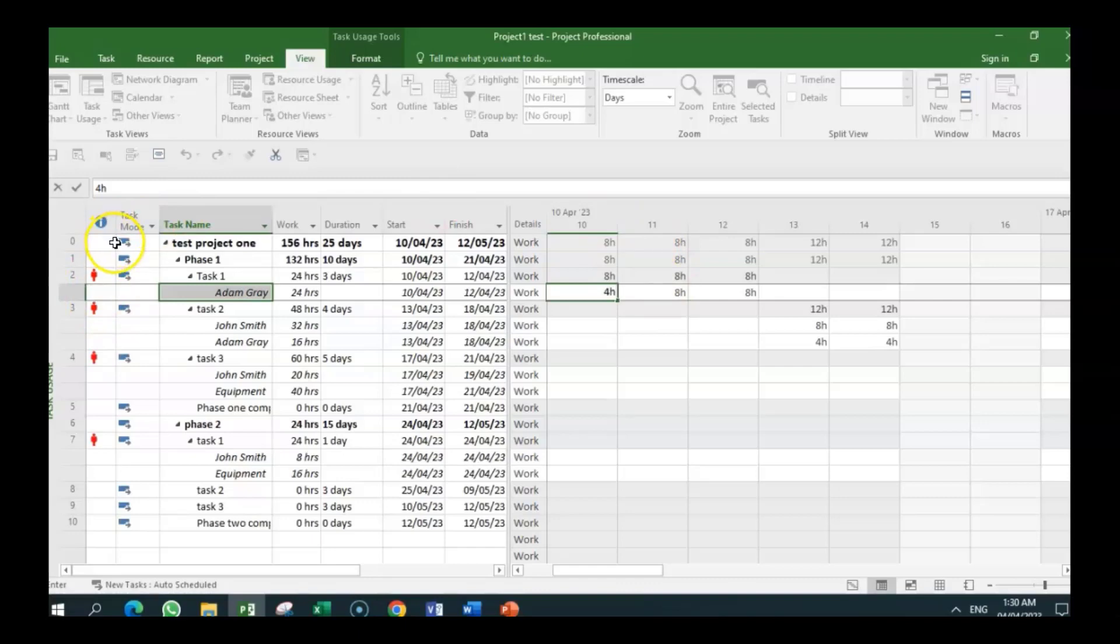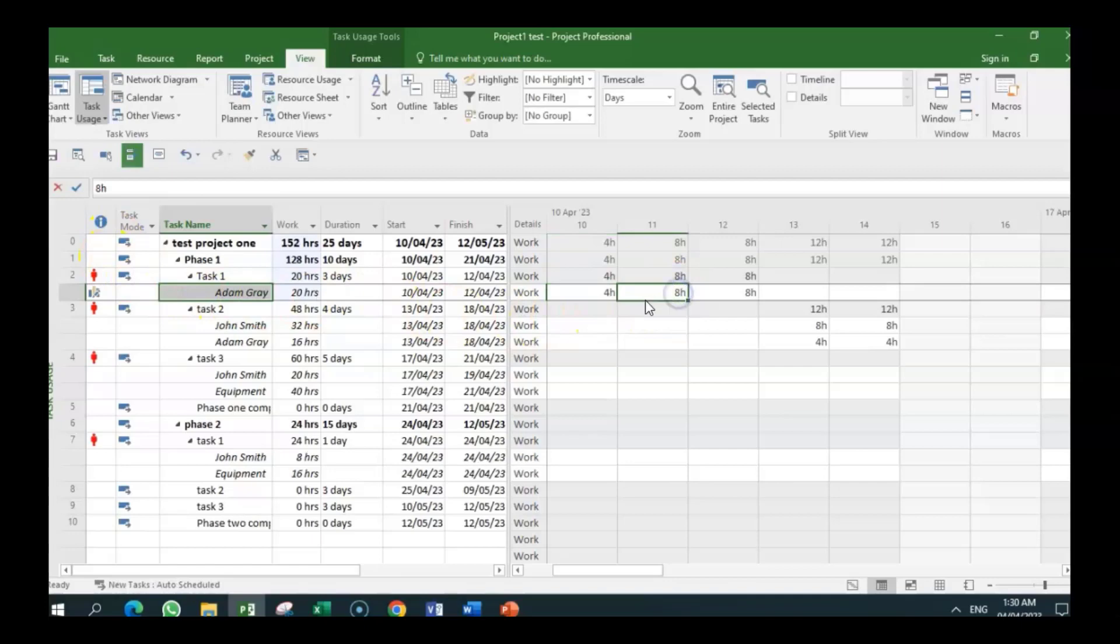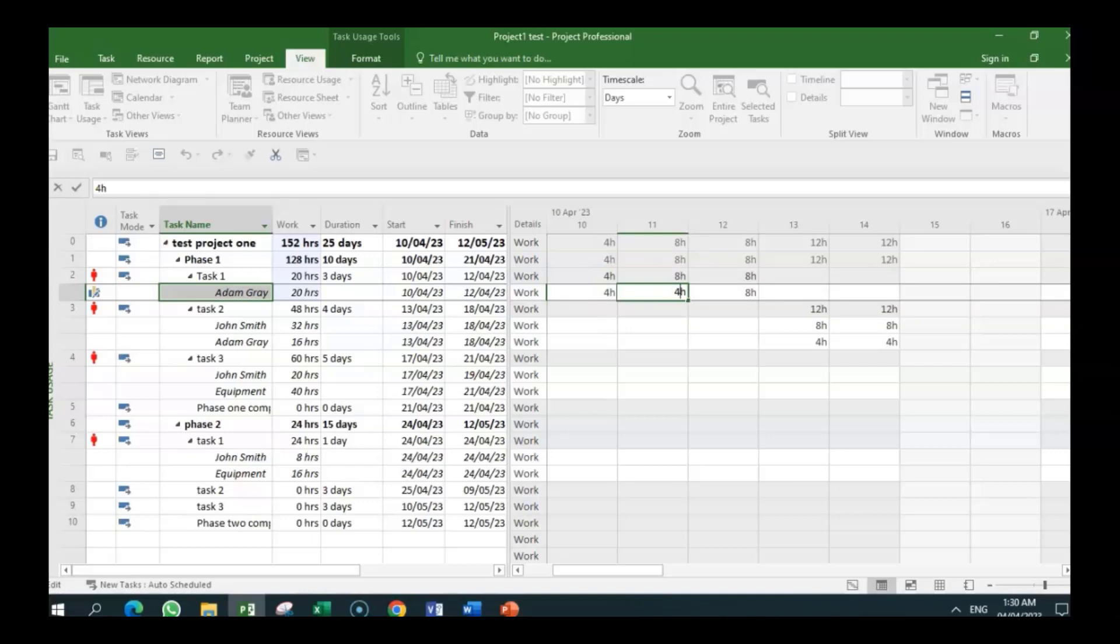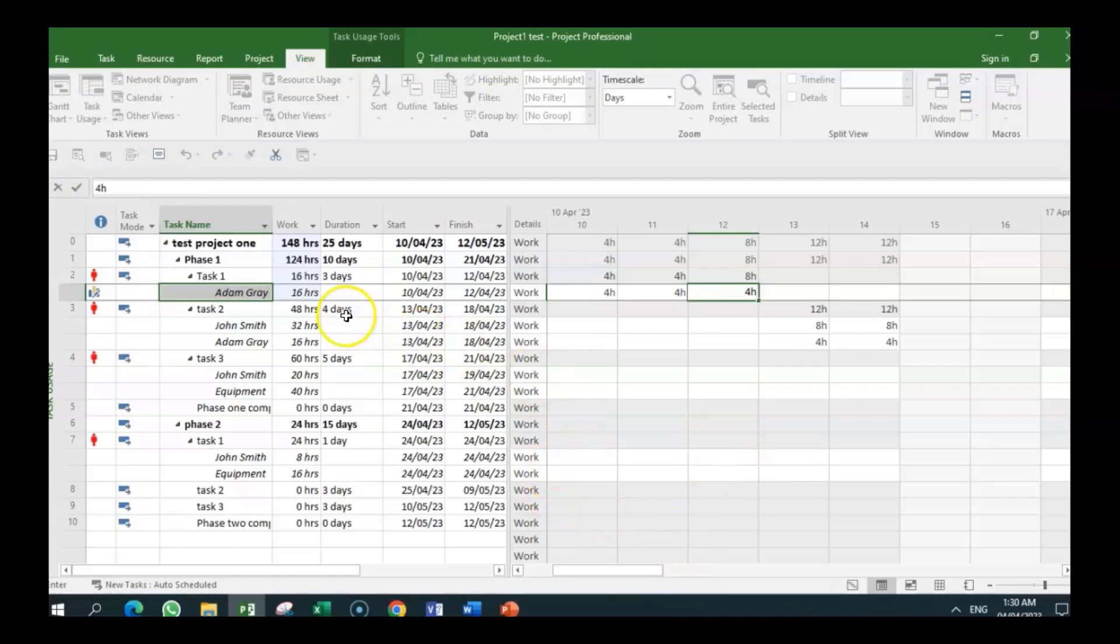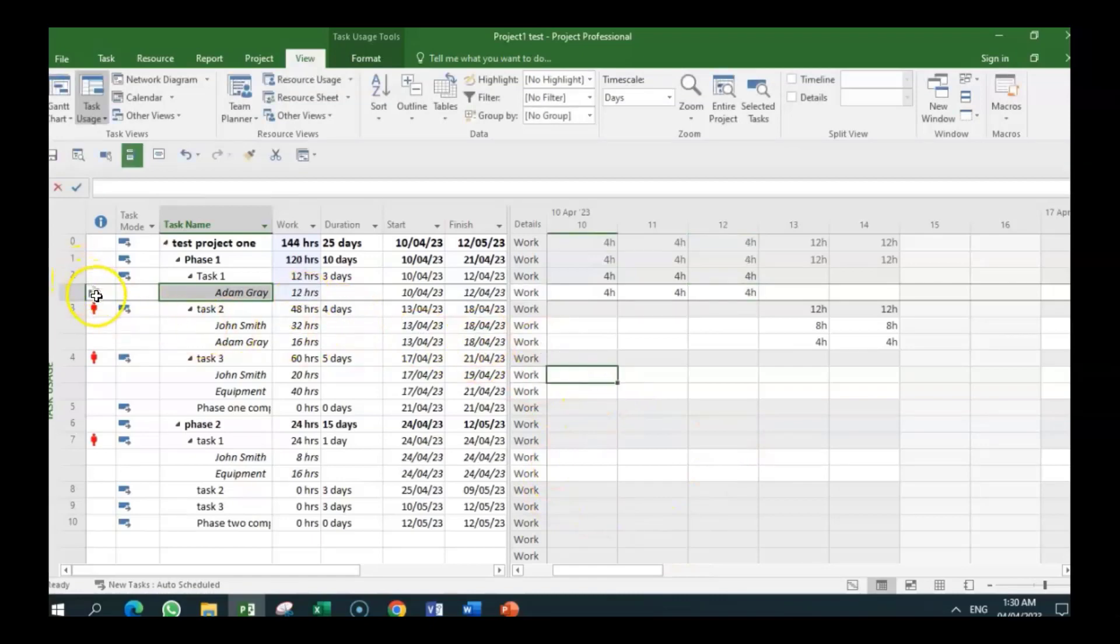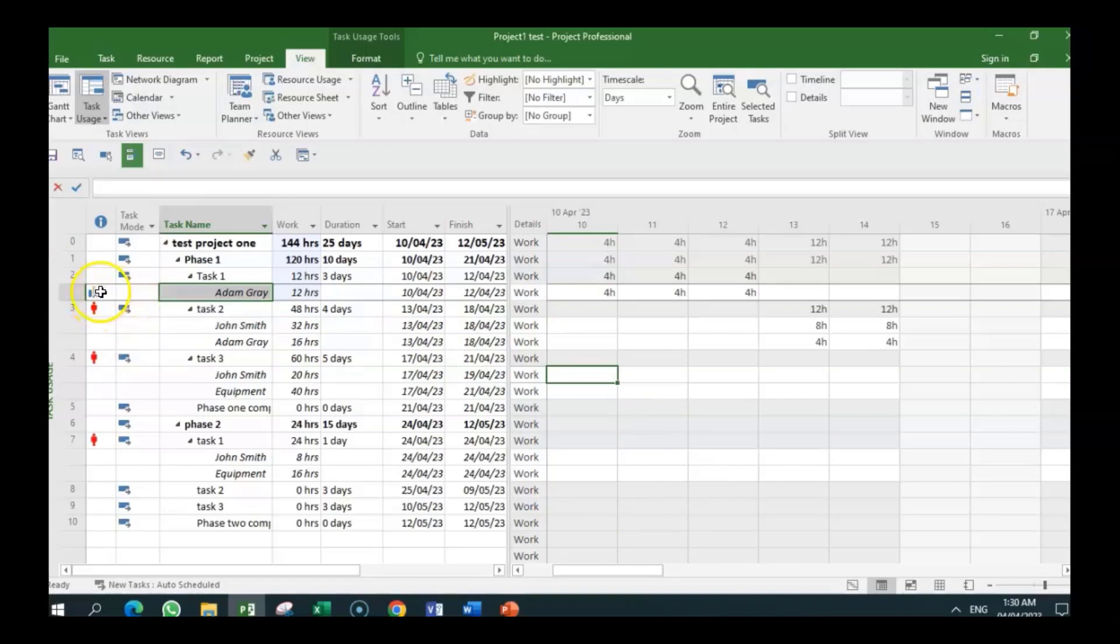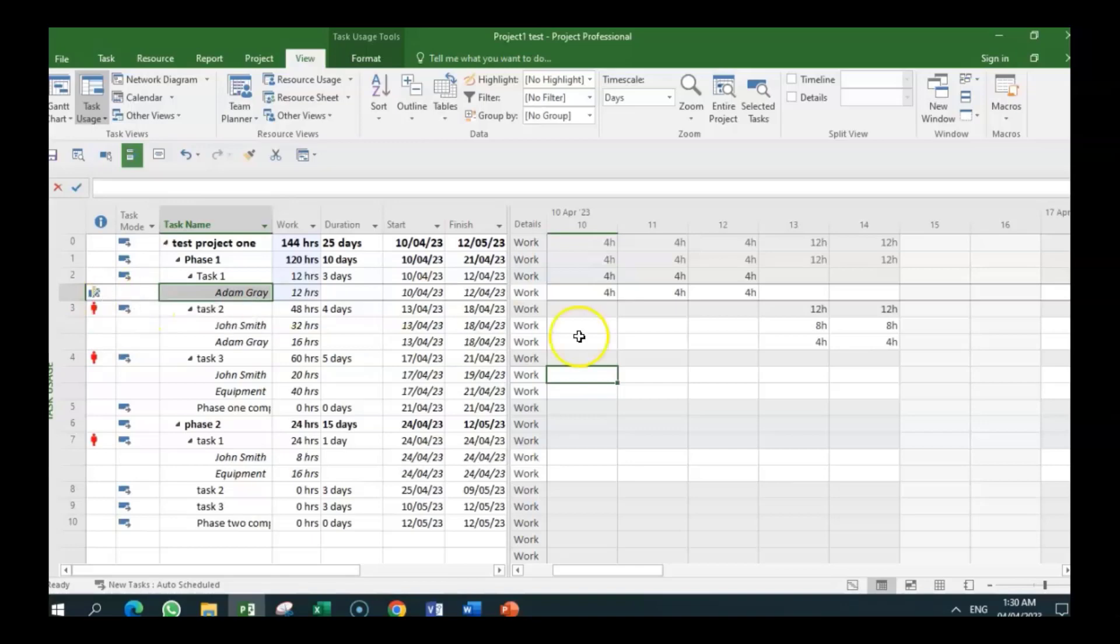Because we know that is all that we have, spoken to HR, and nobody else is available, we have to do something about that. We can go four hours here, because this task is a three-day task, and we can go four hours here also. So we have now given him 12 hours. And you realize the red has moved. And there is a note: 'this assignment work has been edited.' So this is one of the ways.